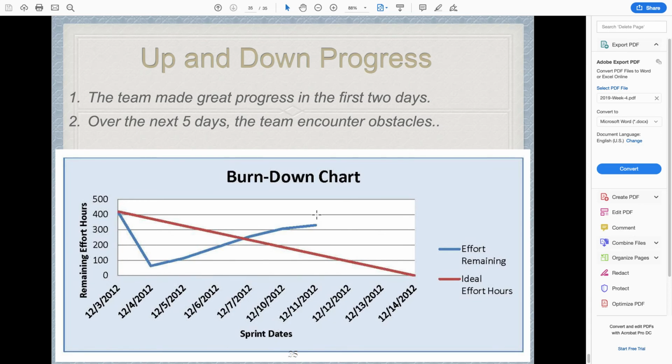Okay, and this is what we see in the middle of the sprint. Okay, we are at day 6, maybe this is day 6. So at first we progress very fast, but somehow we slow down a little bit, and we estimate things wrong, so that as days go by, actually we find out the tasks are more difficult, so this has gone up. Okay, so this is how